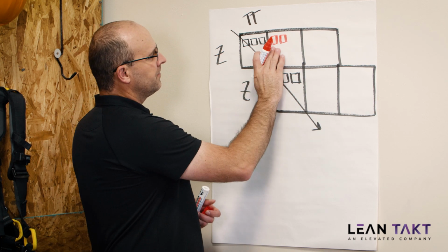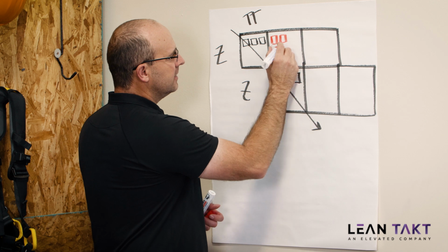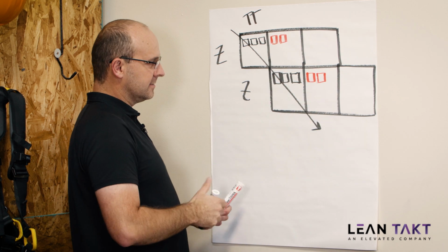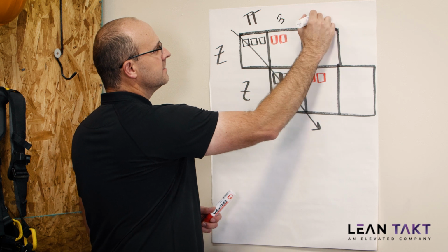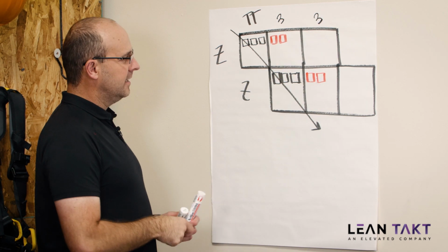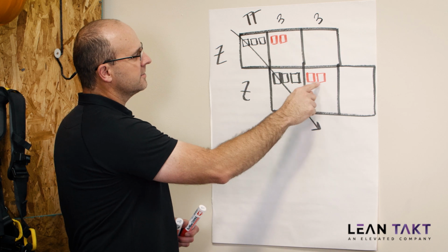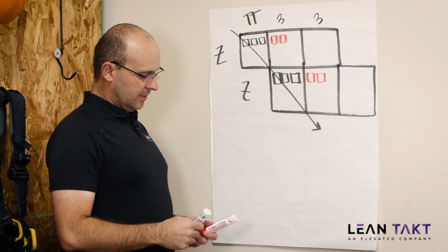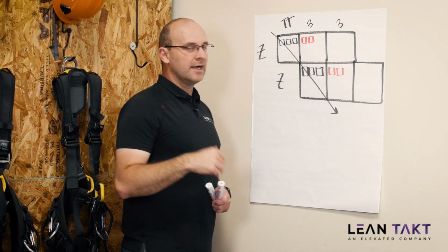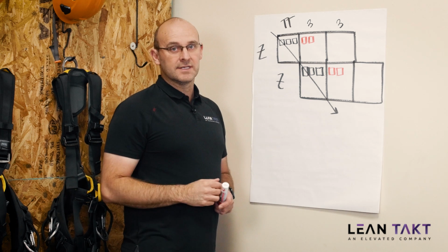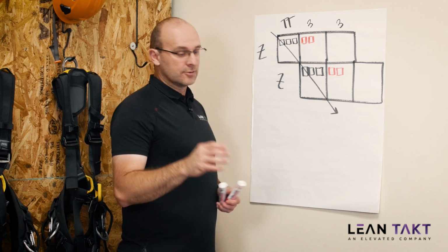If the fire sprinkler contractor does their work and then goes to the other zone on a 3-day takt time, because that's what this is, it's on a 3-day takt time, then they don't have flow. They're on the project, away, on the project, away. So the key here is you may have to level the actual worker counts inside the actual crews themselves.